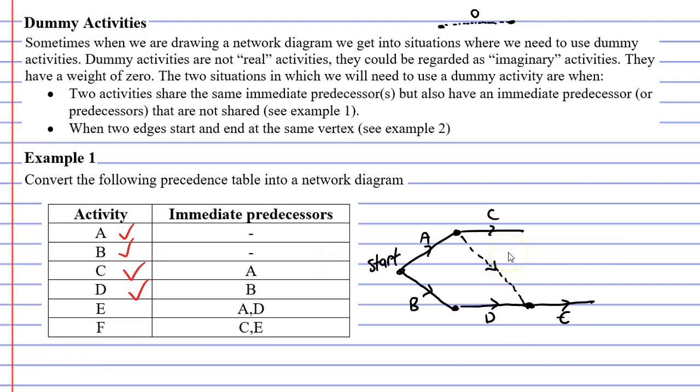And because a dummy activity has a weight of zero, we get the same result as if activity E had come directly after activity A. So we can now tick off activity E and we might as well finish this off.